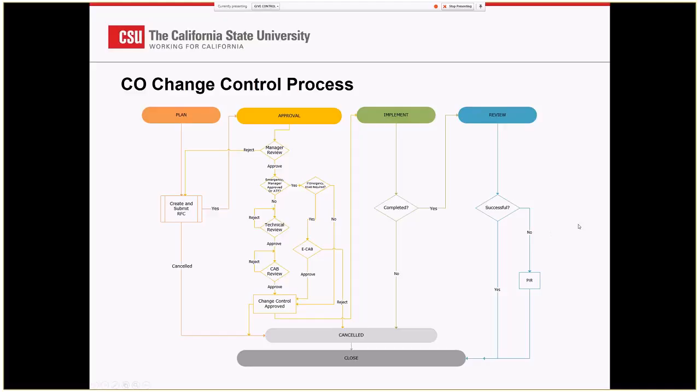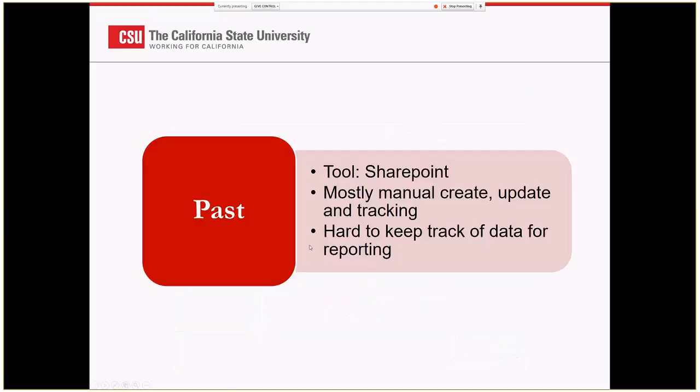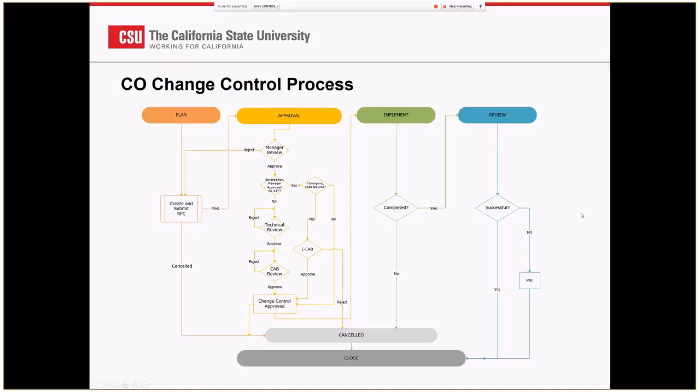One question. Who are the members on your ECAB? On the ECAB, it's usually based on the change. It's obviously the submitter, the person that's been assigned to, the manager of our data center staff. We don't have a designated ECAB group. It's going to be mostly people that are going to be involved with the change, that have been assigned to task. If Gia or I think that there may be some ramifications involving information security or another department, we invite them to the ECAB. So it's kind of an ad hoc thing right now.